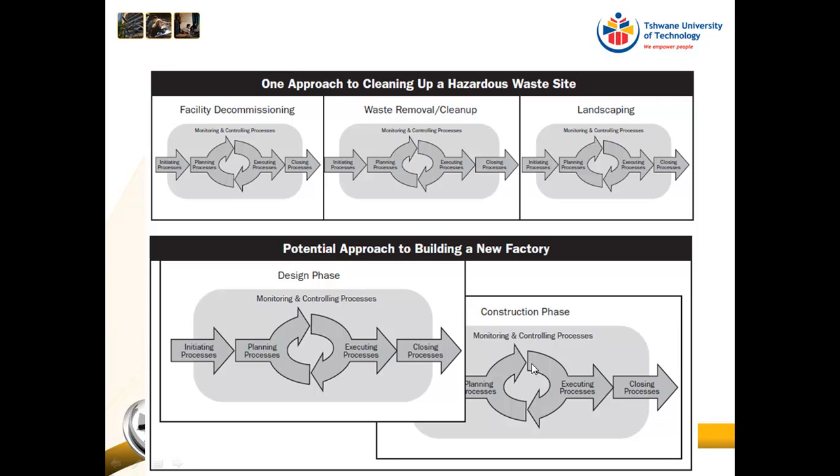Now, the problem with that is that it increases our risk, because if we made a mistake in the calculations in the design phase for the foundation, or not even just a mistake, but say, for example, during the design phase we make assumptions and say that we are going to use a certain roofing material. And when we get to the detailed design of the roof, we find that that roofing material is not going to work.